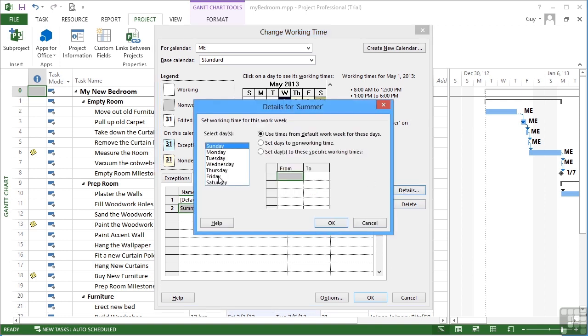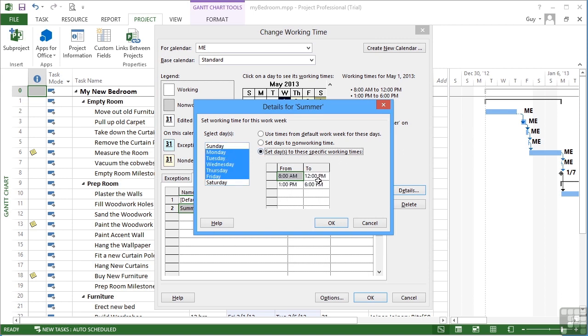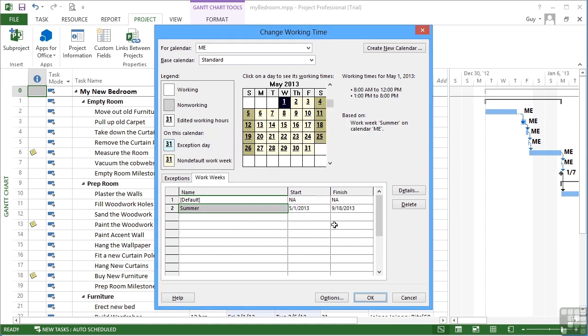It may be that in the summer, from Monday to Friday, I can actually work until 8 p.m., making use of that extra light. OK, now if any of my project falls into this time span, so from May the 1st to September the 18th, then the new hours for that particular set of work weeks is applied. If it falls into any other time, then it assumes the default hours.